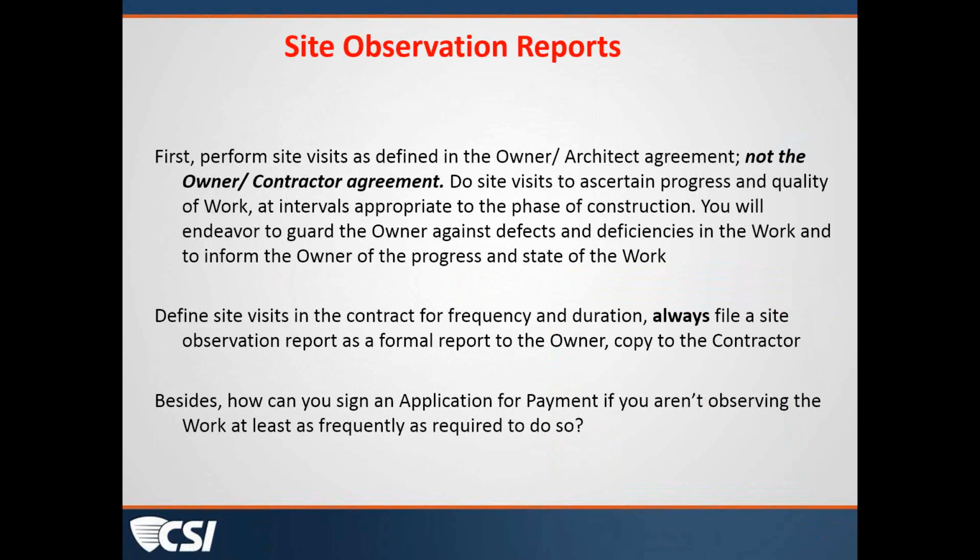We should, in our contract with the owner, define our site observations and what our frequency and duration will be for those visits. We should always file a site observation report when we are at the site, and we should copy the contractor when we do it.